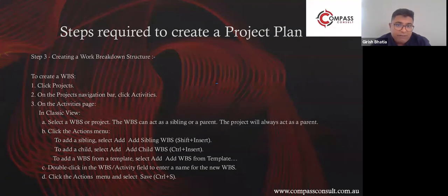The project would be only one project, but under this project there would be different WBSs, each defining a particular area. And when you say a particular area, the 14 plants that we talk about would be 14 work breakdown structures for the project. And then within these WBSs there would be smaller fragments of work which you would be dividing. I'll create a bit of a flowchart over here to help you understand a bit better.